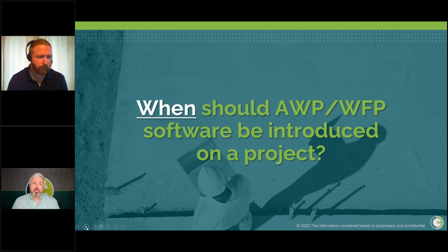Now, that being said, we have talked about this before, that in order to take advantage of construction automation and the workplace planning during construction execution, you have to be able to connect all the different data sets together. So if you are integrating multiple systems together, you need to ensure that you have enough time to get that technology stood up and integrated before you need to use it. So when we say shortly before construction, you need to include enough time for that setup.